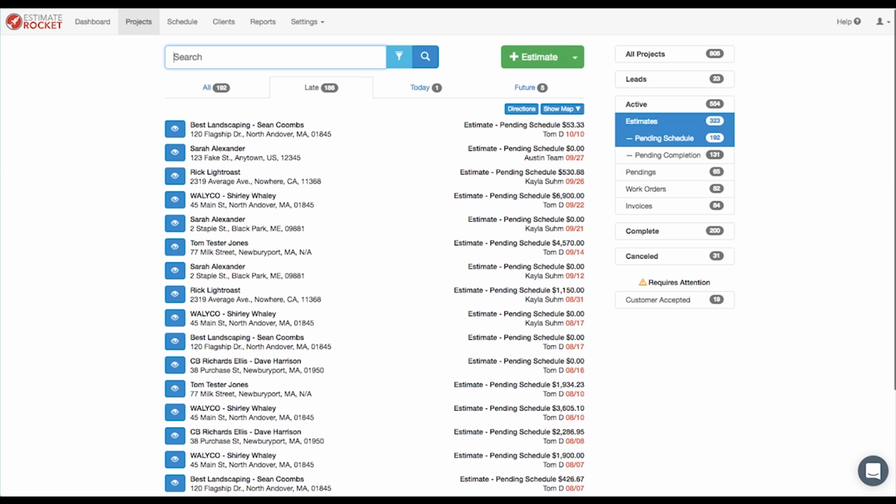You might need 10 different kitchen countertop items that represent the different grades of countertop. Then you could have an item template with all those, and fill in the quantity of square feet into the one they selected, the good, better, best, or whatever item they wanted to quote on, or multiples potentially.